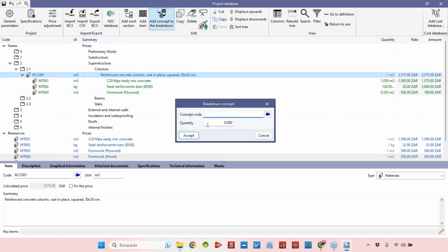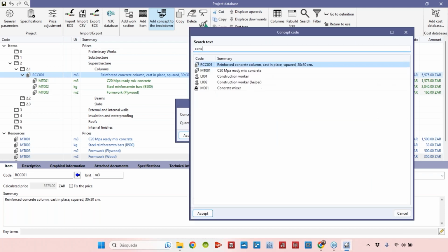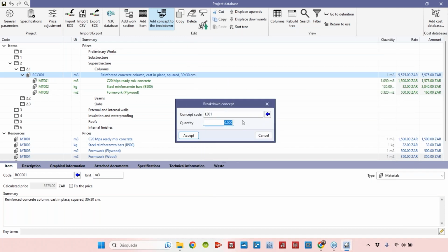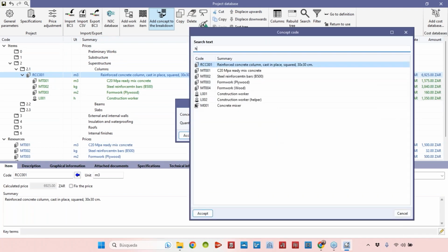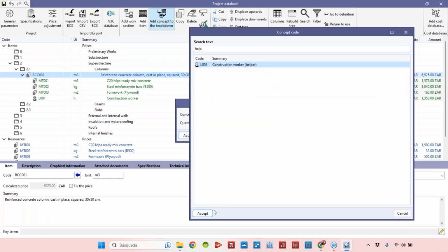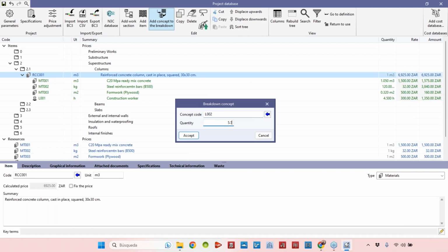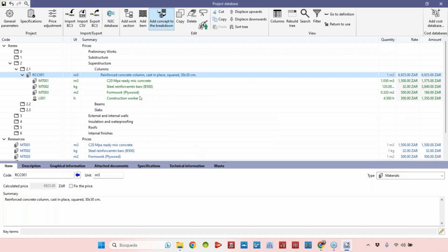Let's add some labors, for example. Construction worker. Let's add the construction worker. For each cubic meter, we need like five hours, maybe four hours, like this. And to the helper, let's look to the helper here. The helper, let's put a little bit more, like 5.5. Okay,